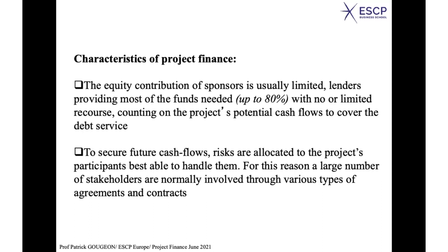because most of the risk, as we'll see, through contracting, with many participants involved in the deal, can be taken out of the project company and transferred through contracting to the many participants. For this reason, a large number of stakeholders are normally involved through various types of agreements and contracts, being tools to transfer the risk outside of the box, outside of the SPV or the project company.